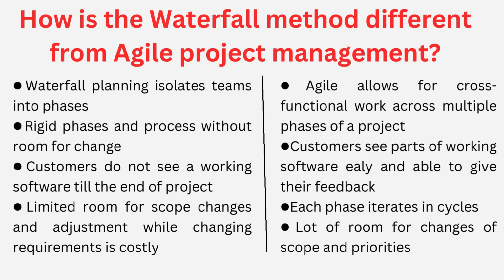Finally, the waterfall method has very limited room for scope changes. The scope is decided and somewhat carved in stone once the requirement phase is completed and the software requirement specification, the SRS, is signed off. So it's really limited. Therefore, any changes will result in revisiting the whole requirements, redesigning the system, and changing a lot of system parts that are already coded. So this will be very costly in terms of double effort and time taken.